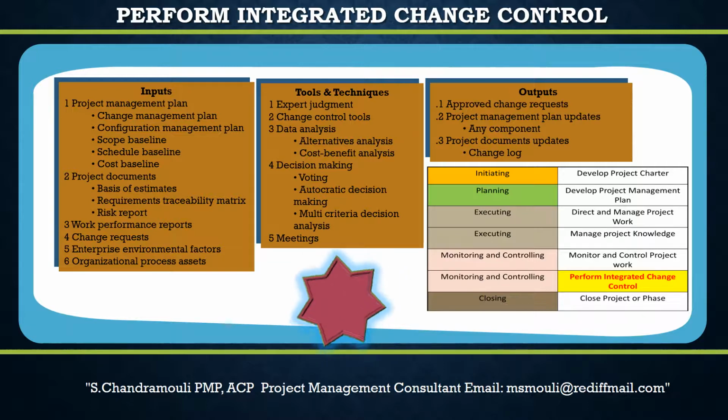The CCB may also review configuration management activities. The roles and responsibilities of these boards are clearly defined and agreed upon by appropriate stakeholders, and documented in the Change Management Plan. CCB decisions are documented and communicated to the stakeholders for information and follow-up actions.